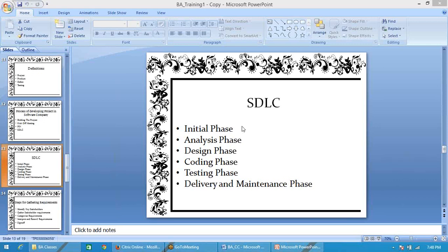And this BRS, which is the outcome from the initial phase, is an input for your next phase, that is analysis phase. Okay, over here, by looking into the requirement details, we are supposed to do 4 different tasks under this analysis phase. So the first one is a feasibility study, then doing a tentative planning, and then selecting a technology which is used for that particular project, and finally requirement analysis. Okay, fine, Arshad? Yeah.